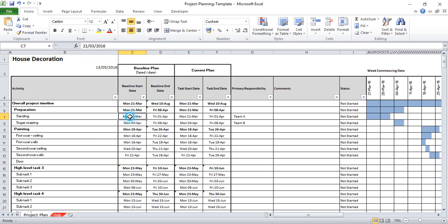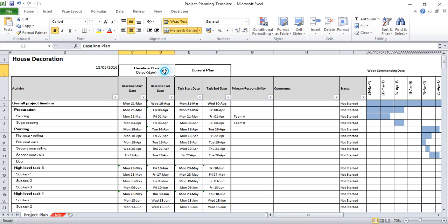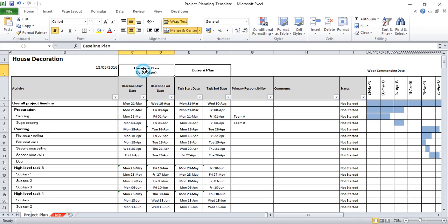So I need to go in and change all of these dates. Let's do my sanding dates first. The first thing to be aware of is that we've got planned dates, baseline dates, and we've got the current plan. The idea here is that when communicating a plan, it's useful to have a baseline. The baseline is your last agreed upon set of dates that you're working towards.